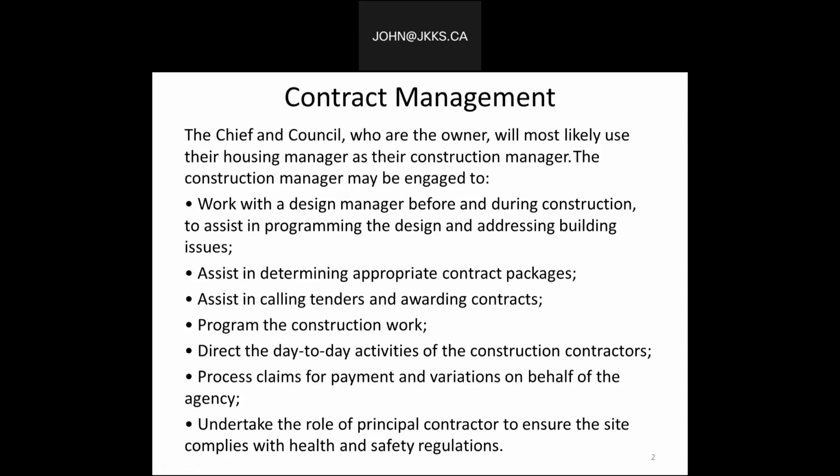So when we take a look at it, some of the key points: work with the design manager before and during the construction to assist in programming the design and addressing building issues, assist in determining appropriate contract packages, assist in calling tenders and awarding contracts, program the construction work, direct the day-to-day activities of the construction contractors, process claims for payment and variations on behalf of the agency, and undertake the role of principal contractor to ensure the site complies with the health and safety regulations. Again, this is a quick overview of contract management.